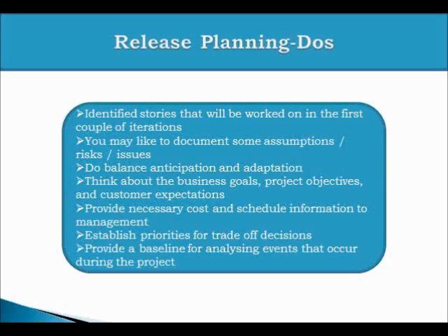So for example, the release plan may provide you 300 story points. Now after baselining the release plan, you know how many story points have been added or deleted from the release plan. So net story points added represents the net scope change that happened during the release cycle.